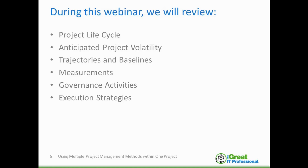The first topic of discussion is: under what circumstance do you really need to apply multiple lifecycle methods? You may be used to determining you're only going to use agile, or only a traditional method, or any of the other available project management methods. But in complex projects, you might need to apply multiple methods — for example, when project deliverables span research, early development, full production, or the procurement of fully developed products, or any combination thereof.